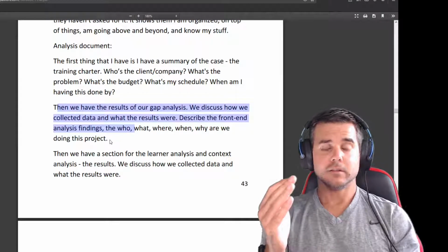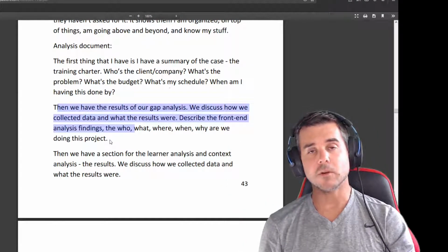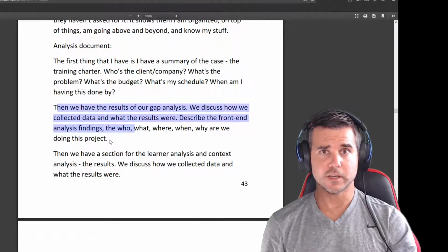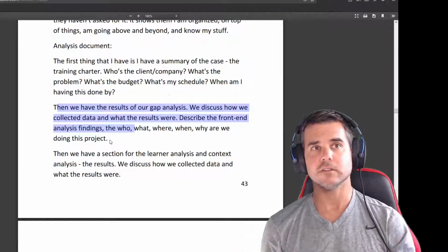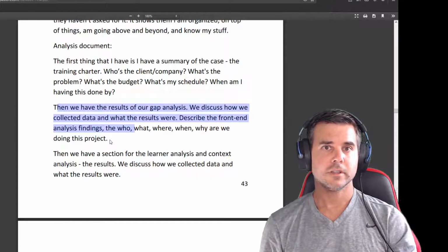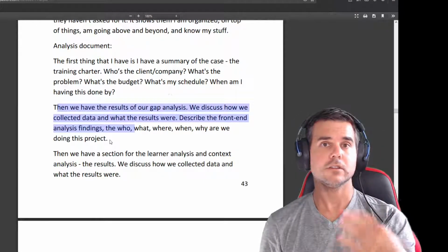Let me give you an example. I'm going to develop an hour-long training for you. If you would like videos in the training, each 30-second or 60-second video might cost $1,000. So I'll add that in, and that way they can pick and choose a la carte what they want.